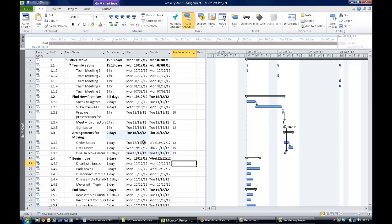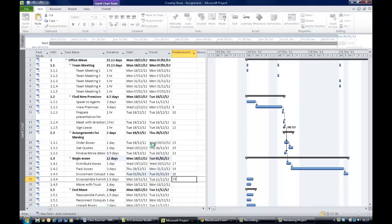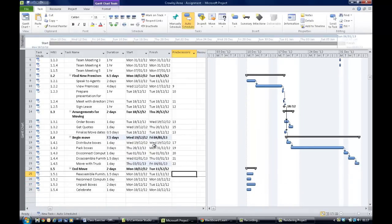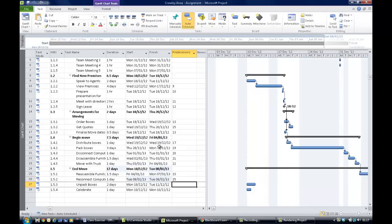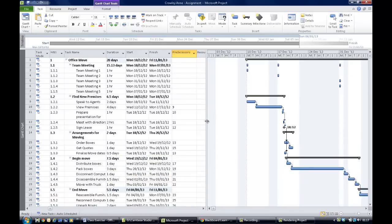Distributing boxes follows finalized move so you put in 17. Packing boxes follows distributing them at row 19, so that's 20. Disconnecting the computers follows packing boxes in row 20, then 21 and 22 link those together. Reassembling furniture follows moving with truck at row 23, and this task is row 25. The last activity follows from row 27. You now see a real project structure taking shape on the right-hand side with all predecessors in.